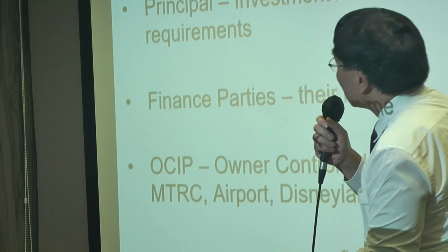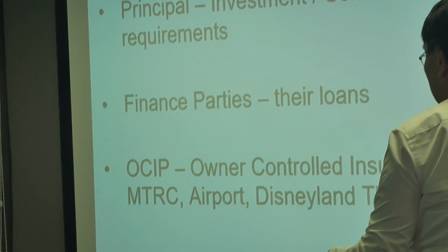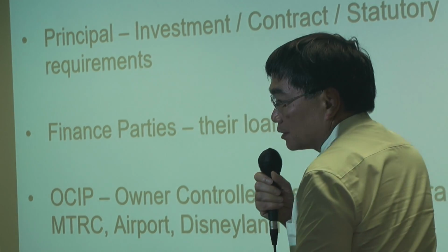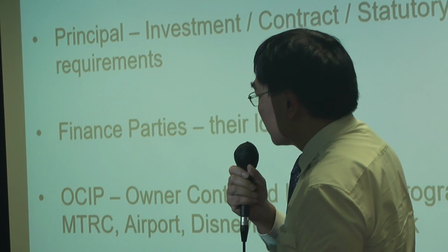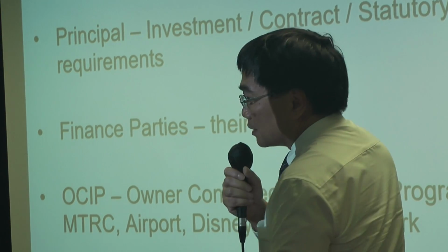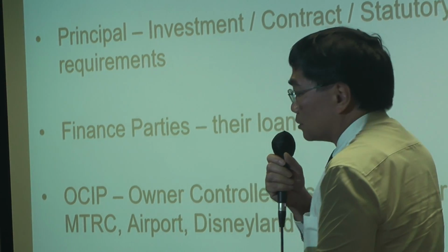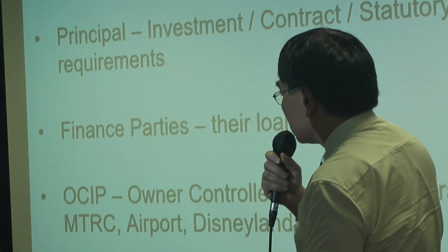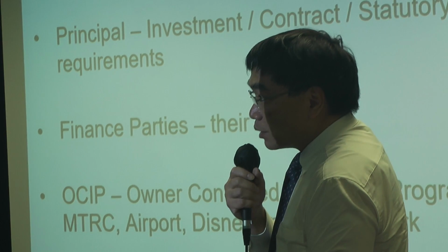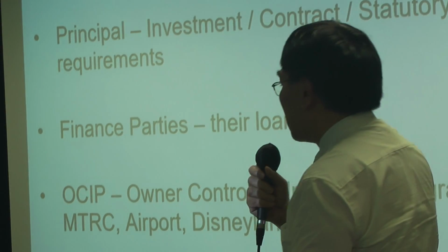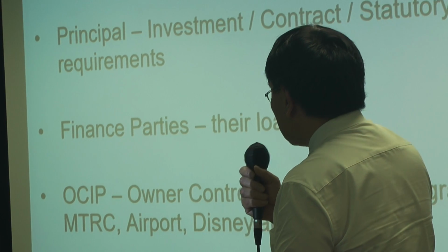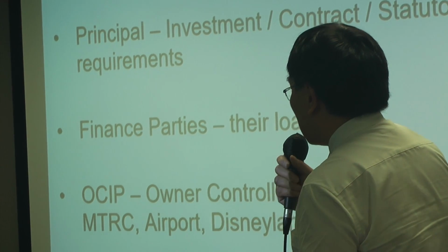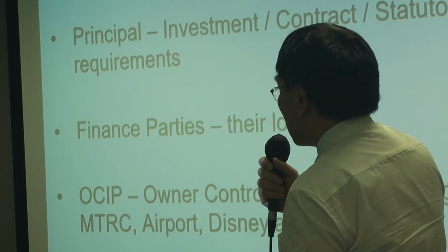Okay, so John has explained more about insurable interest. For the insurance arrangement, different parties have different interests in the project. The contractor has an interest in the project, and owners have an interest in the project. So nowadays, more and more insurance policies are being arranged by the owner rather than by the contractor, particularly for government projects or other statutory organizations. We call it OCIP.